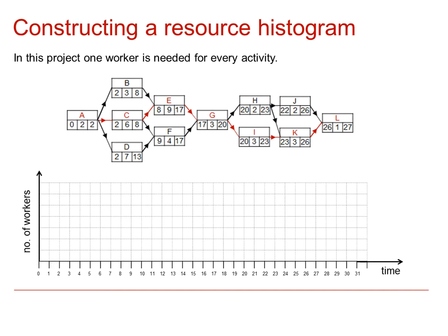Well, we'll start by considering a project where indeed each activity only requires one worker. But of course, because some activities can take place at the same time as each other, it will affect the total number of workers that we need at any part of the project. We start by putting in a rectangle which represents the critical path.